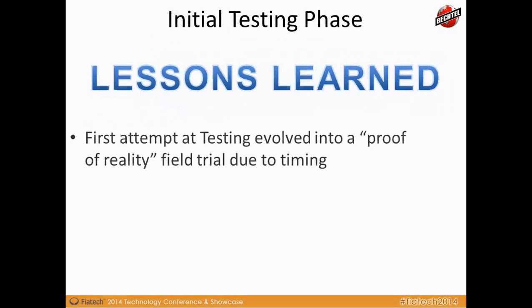So just to codify that a little bit more, to give you some examples of the lessons learned here: we began gathering the requirements in, I guess it was November of 2011, and then within 6 months we had the initial solution available for testing, which included those integrations that I talked about, and we began the first field deployments to the projects on Curtis Island in June of 2012.